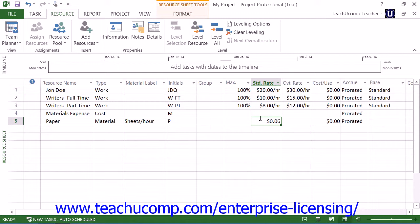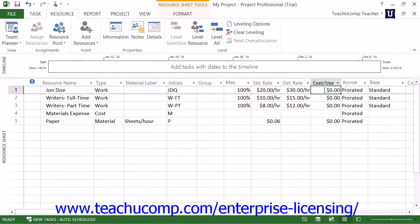Many times this information is entered into a cost per use field, although you can also specify a standard rate for material resources if needed. Conversely, you can also input a cost per use value for people resources, although this is less commonly used for people resources.